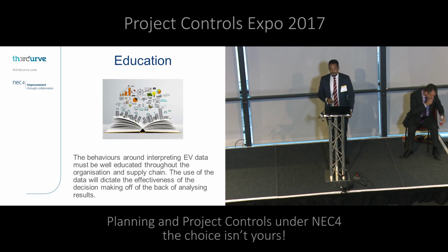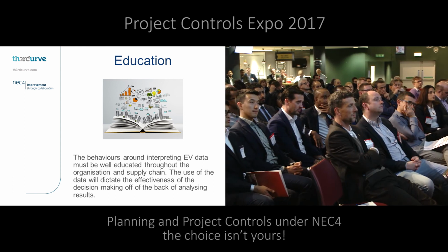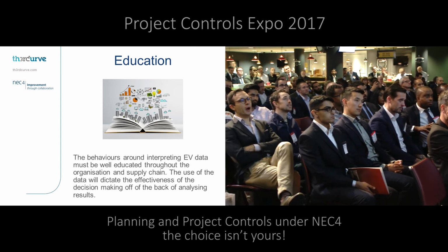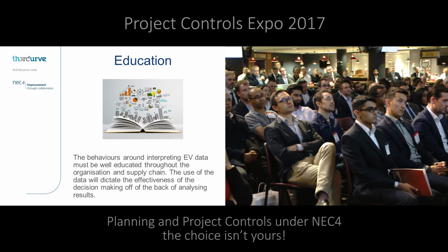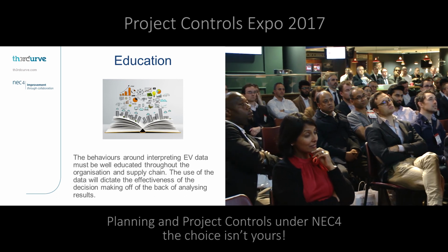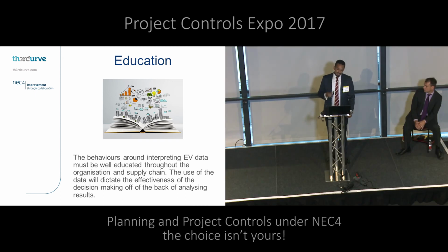I've seen it too many times where people are used to the CPM world, you know, critical path items, milestone moves, it's red, amber, green, great. They start looking at EV information, and they ask, okay, well, can we rag it? Well, it's not how it works, guys. EV is about the backup of work that we're lodging. If we are at a 0.7 SPI, we've got to go 1.3 of where we originally planned to get back to where we need to be. That's just to get back on plan. People don't really understand what it means, and we push loads of float into plans and let stuff move around. We need to educate everyone across the board, really.